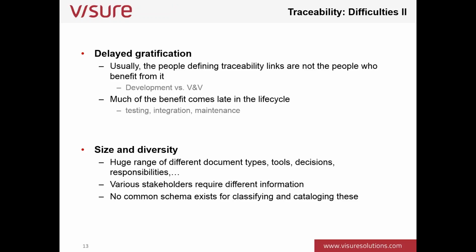When we have got a huge project with thousands of requirements, with thousands of other artifacts like test use cases, design elements, maybe even code, it's going to be really difficult to keep everything traced, and each stakeholder is going to need different traceability information. For that, we always recommend to have a set of traceability policies, exactly how we are going to trace the elements, which is going to be traced with which, and things like that. That's super important.